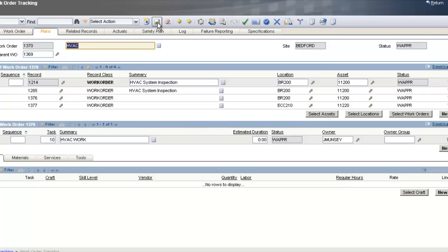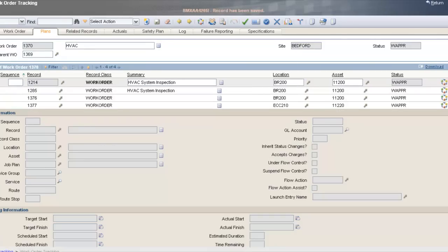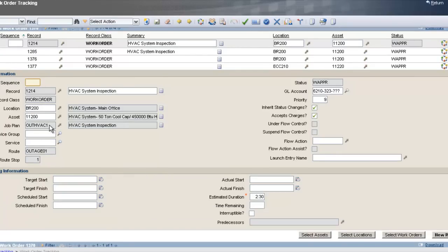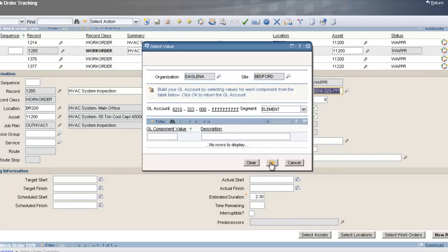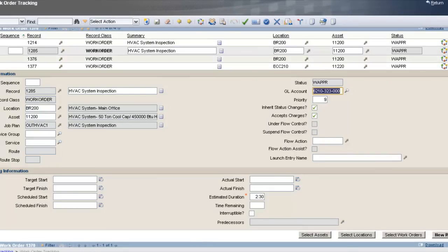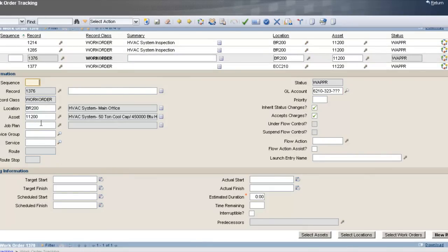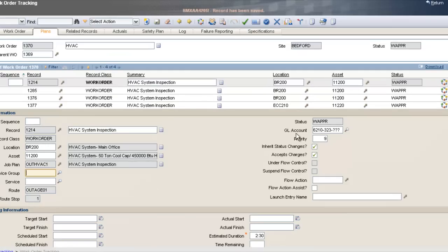Going through the child work orders — the existing ones are already planned out with a job plan. The two I just created new have no job plan, so I'll add a job plan to those. As the HVAC department head, I've taken existing work orders from the backlog, added them to the HVAC department work order, and created a couple new ones just for the outage. Now I have four work orders that the HVAC department will be doing during this outage.